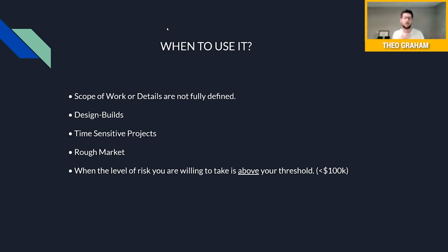So on a project where they want to move a little quicker, this could be an option, because you don't have the luxury of getting plans, sending them off to 5, 10, 15 different trades, getting all that back, vetting it, filtering it, dumping it into your documents, and pushing it out the door. That is a long process. So there could be an avenue where you can use a cost plus situation that gets the ball rolling, gets them on your schedule, and gets a contract signed.